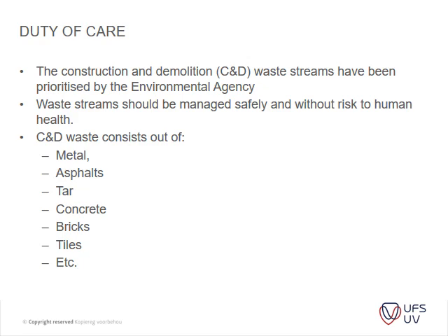Okay, and there's actually money to be made out of some of these demolitions. Sometimes you can sell some of your demolition material for fill in other areas. If you've got a contractor that has a lot of fill to do and he can use that demolition work there, then you can actually sell it to them. So remember that. Don't just pay money and go and dump it at the nearest site. You can actually make money from that.